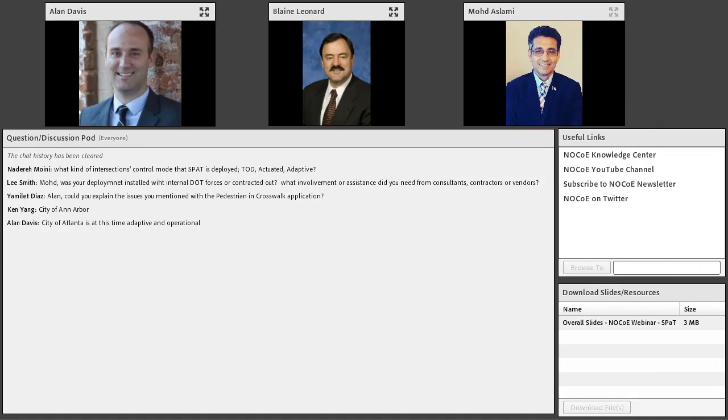And what they did was they took a particular application, a red light violation warning application, and basically wrote a CONOPS document, if you will, and said, here's the data that needs to be sent, the SPaT and MAP data elements that need to be sent, here's the frequency, and they wrote up a process of how you would see that on the automotive side and verify that you're getting the right data at the right frequency.